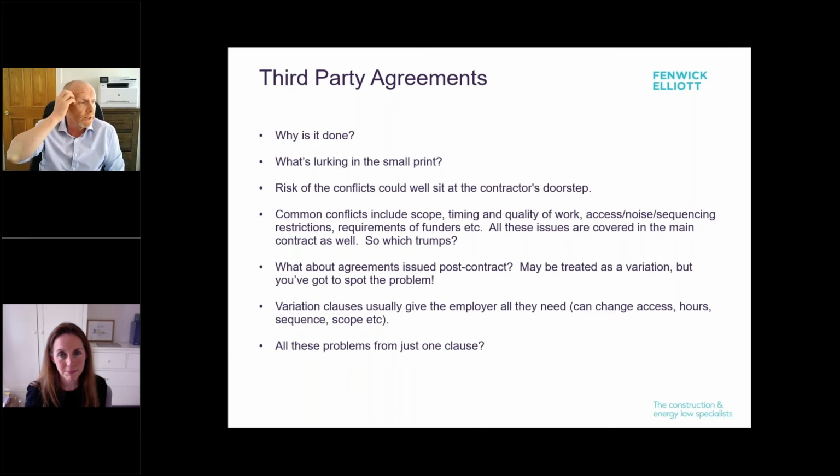I had a project a few years ago where it was refinanced partway through construction, and the new bank came along and said, any building contractor must provide a performance bond. That's a problem for a building contractor who hasn't been asked to provide one at the beginning, because which surety is going to give a bond halfway through a project? They might think, why am I being asked now? So that's what the finance agreement said. The building contract said something different, so there's a clash.